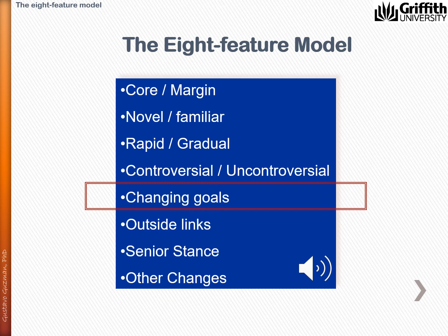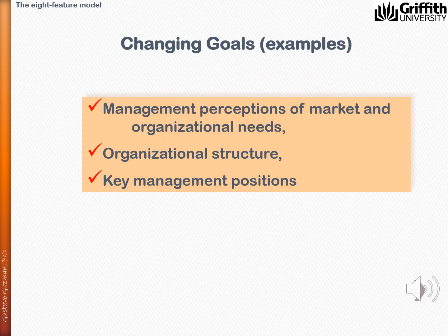The implication for the project manager is that it is necessary to manage expectations of all those involved. It's necessary to tell different stakeholders in different ways that goals may change. It is necessary to explain why, in order to lower the level of uncertainty of the project.